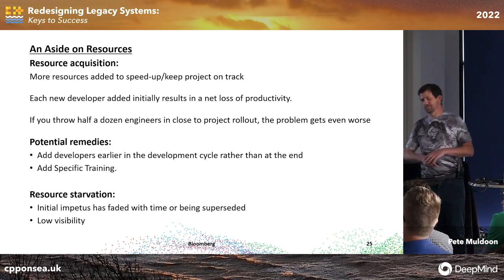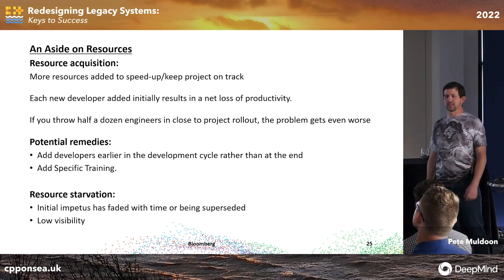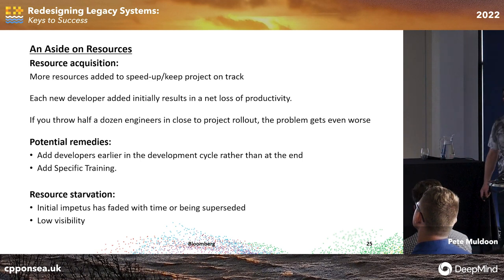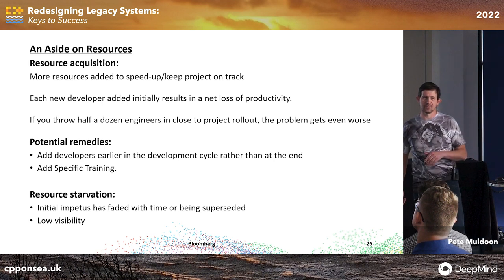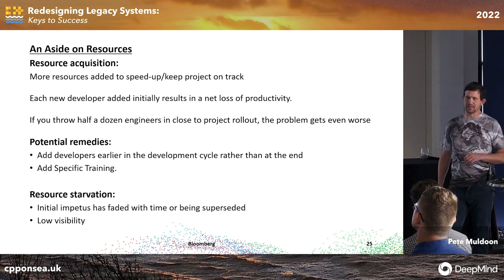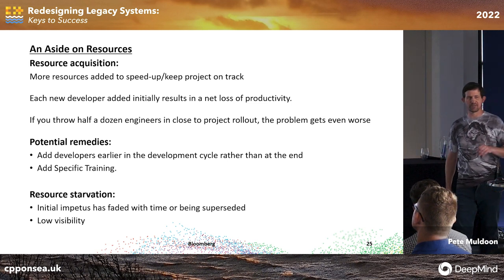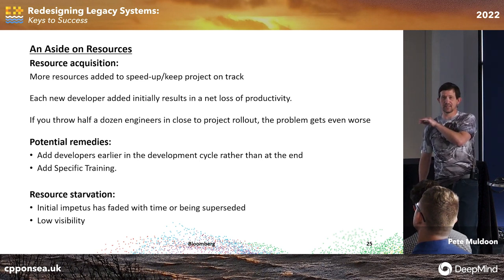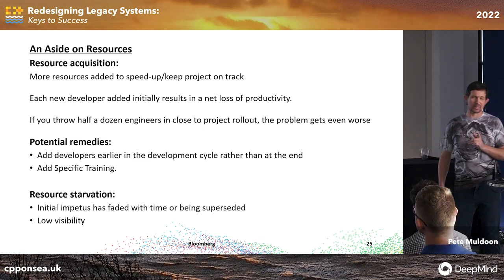In other words, big problem in production, lots of fallout. The solution is for us to start on this thing. You know, 4 months later, nothing's happened, or less. People are complaining, but it's a dull murmur, a dull ache. You can have people taken off, right? And that's usually a problem with your visibility. But if you have observable milestones, you can show how far along you are, and you show that to higher management, right? You don't need to have an engineer down looking at your code. That can help, but it can be tricky.